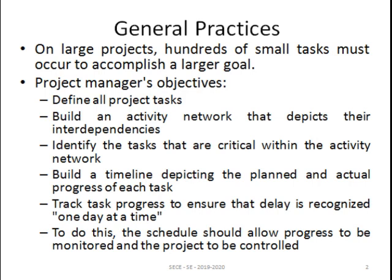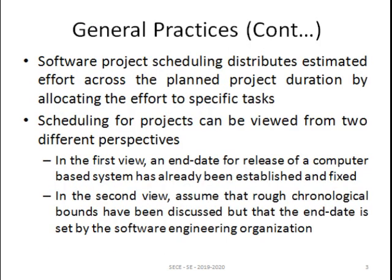These are all the activities which are going to be done in the project schedule. The schedule should allow progress to be monitored and the project to be controlled. Software project scheduling distributes estimated effort across the planned project duration by allocating the effort to specific tasks. For each and every task, some time will be allocated and within that particular time the task has to be completed.